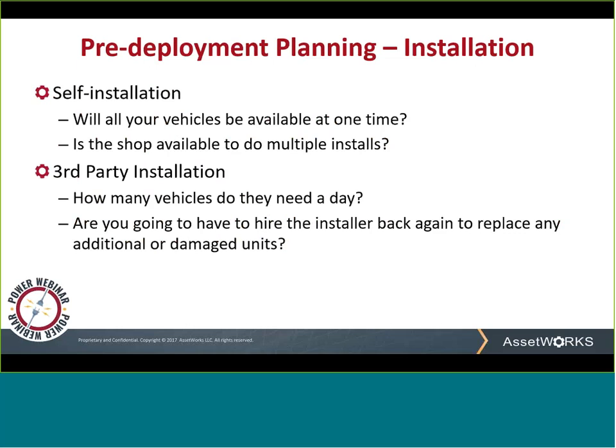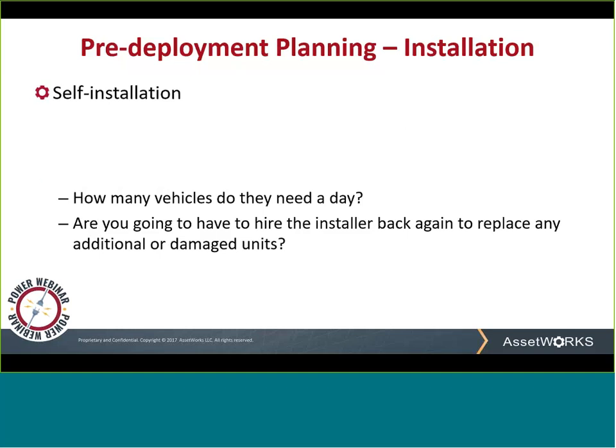Instead of installing the hardware yourself, you may want to hire a third-party installation company. You need to consider when they are available and make sure your trucks are available at the same time. How many vehicles do they need a day? That leads to cost. Something that is often missed with hiring installers is if travel is included. Are you going to have to hire the installer back again to add any additional units or replace any damaged units? That leads to cost.